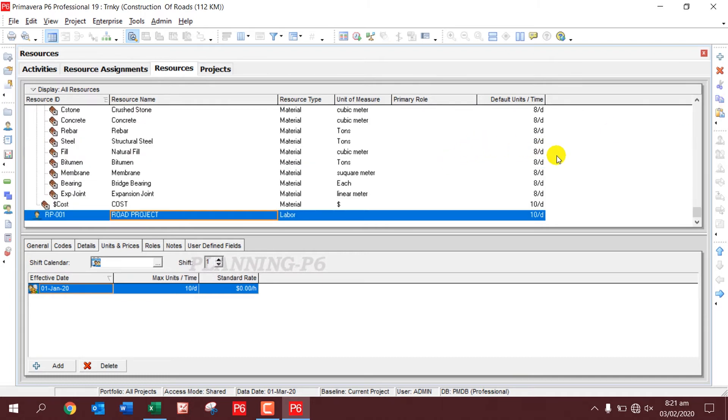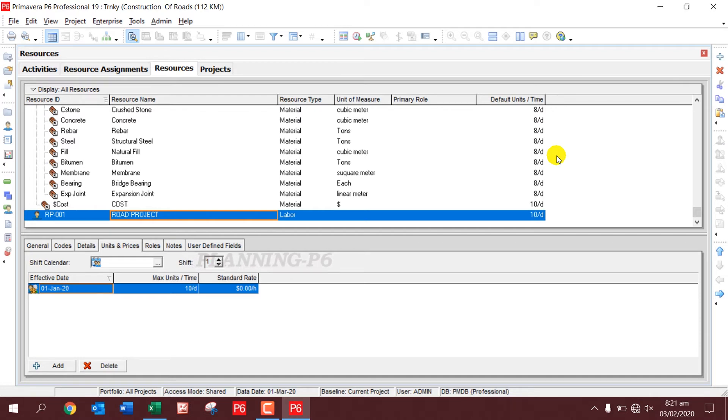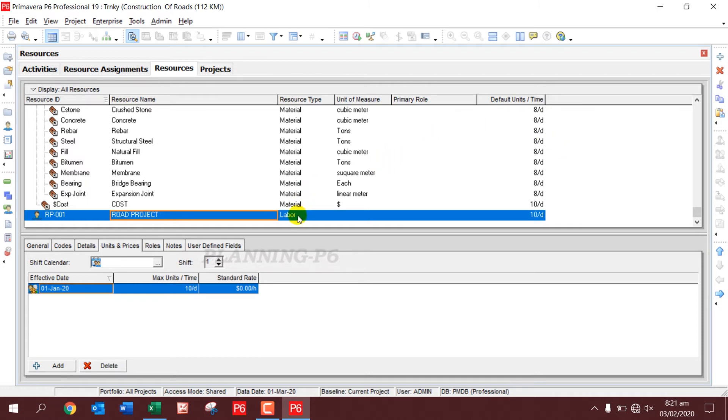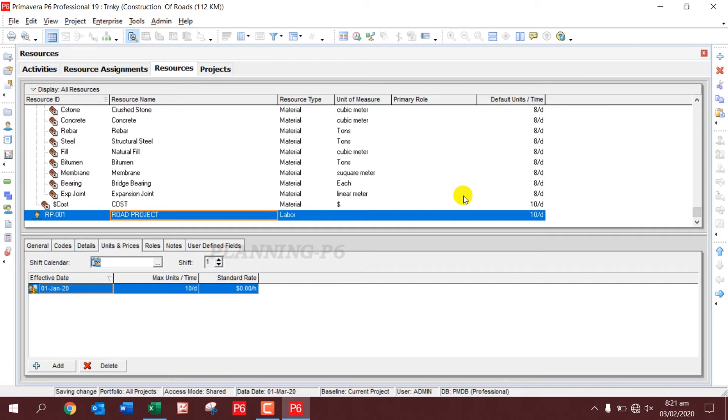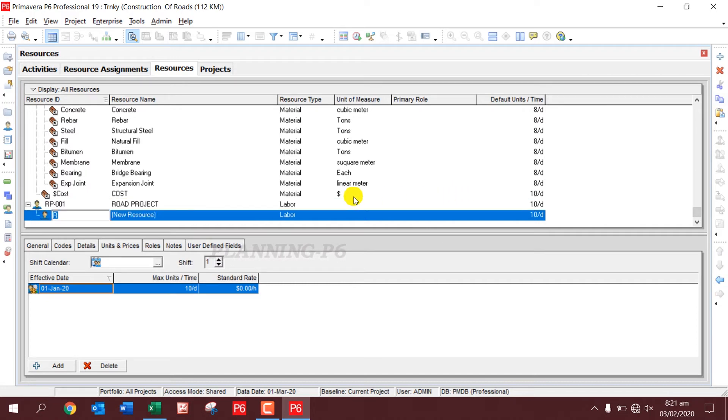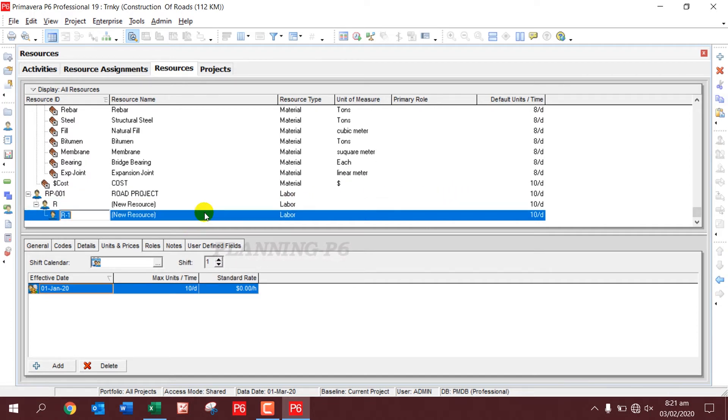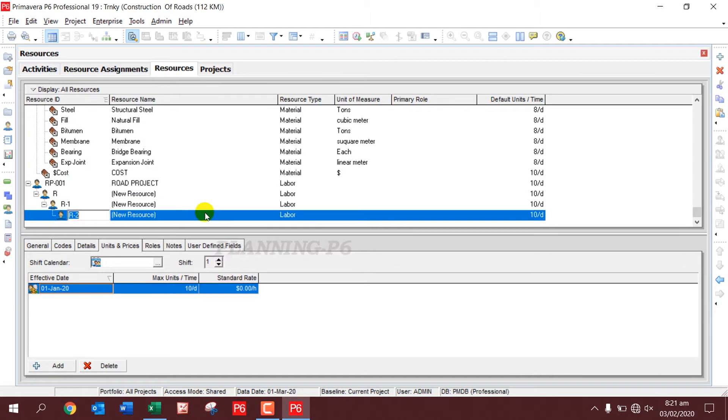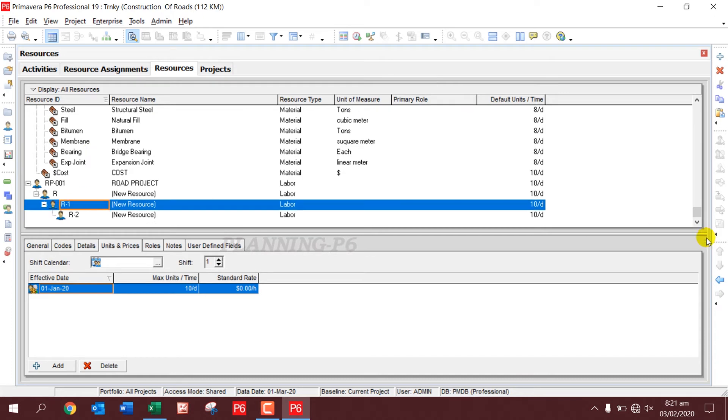In Primavera P6, the resources structure is the same way as we created the WBS. So I will name this resource as Root Project, and again I'll add. I'll hit the Insert button - you can see here I add three resources more.